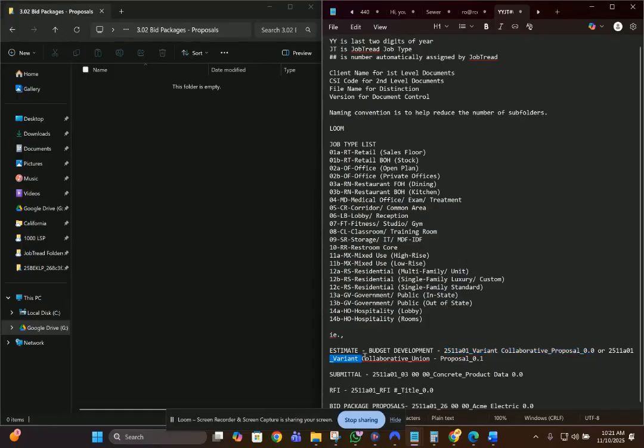If for some reason you want to distinguish what type, maybe you're doing a first floor proposal versus a roofing proposal, you can go ahead and put down a title that distinguishes between the two, in which case this would be the first of its kind, so that would be a 0.0. But any revisions, you could make them a 0.1, 0.2, 0.3. That's it. Stick to it. Be strict about it. You'll thank me later. What's also great about having the project number is that at a glance, you know that this is one of your projects that you did back in 2025. It is a mixed use project, and this is the first proposal of that kind.